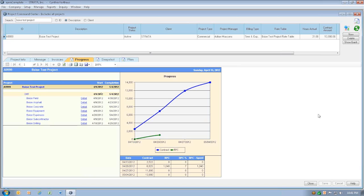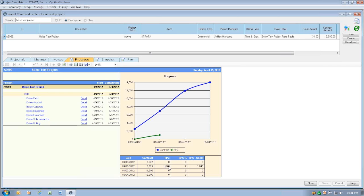Down below, we're going to see the major deadlines and how much of the contract we thought we would have completed by that point. And then it's comparing what we're reporting percent complete. We've only reported about $1,000 of work done, or about 7% overall. And so it's marking those three columns for us.